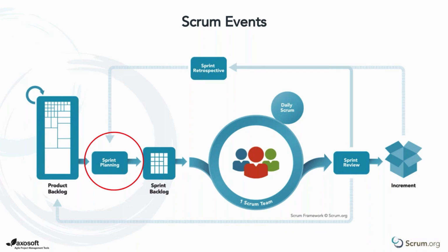Now, one thing, and I was just reading an article that I was quoted in, and there are some misnomers here as well, some myths. You do not need to build out a full sprint backlog to start the sprint. You need just enough work in there to get started. The article I was reading said that the sprint backlog is built to define all of the work to be done in the sprint.